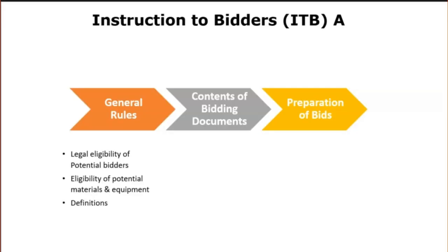Definitions talk about prohibited practices related to fraud and corruption and other national rules prohibiting unethical behaviors like sexual harassment and abuse. The term eligibility concerns meeting national legal requirements and is to be differentiated from qualifications of the bidder, which refer to the production capacity, turnover, financial strength, and experience of the bidder.